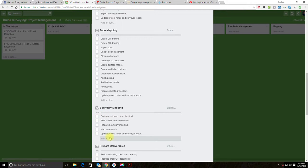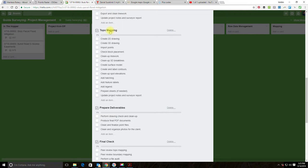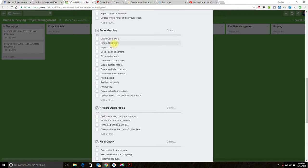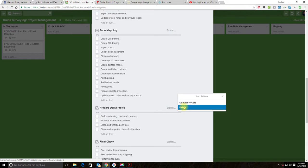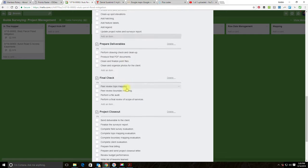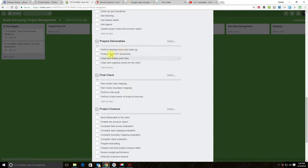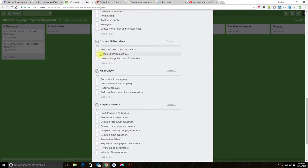We delete the boundary mapping checklist entirely since we're not doing boundary mapping. For topo mapping — the main section where we add value — we keep: 2D drawing, 3D drawing with surface and contours as promised to the client, import points, place topo blocks, clean up line work, clean up 3D break lines, surface model, create and label contours, spot elevations and hatching, feature labels and legend. We remove sheet preparation since the client is just getting a drawing file. For deliverables, we remove PDFs for the same reason; we keep the drawing, point files, and site photos.